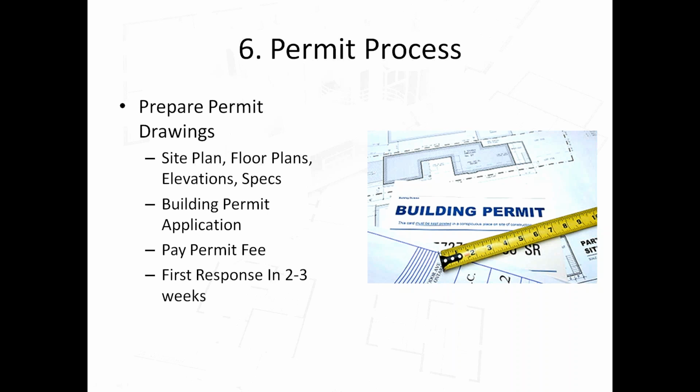You won't get the actual house measurements, but you'll get the overall lot, and then you take measurements on site of the house, and you'll sort of reconcile the two. In most cases, they have accepted that because it's been fairly accurate, and nothing really jumped out as being a big liability issue, right? So I would say more than 95% of the time that's worked okay.